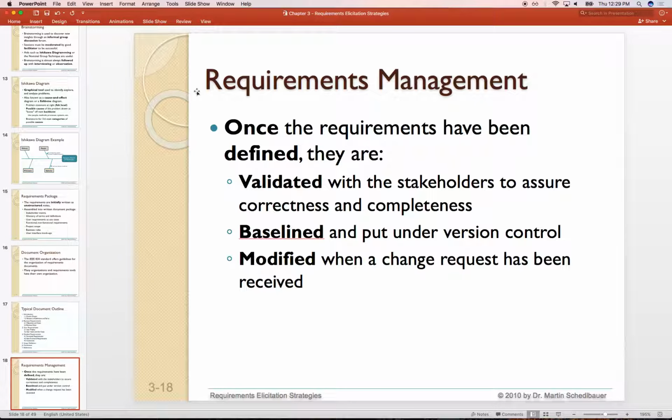And it will be baselined again, and we decide that the delivery phase has either pushed ahead, or we might have come to the conclusion that we can negotiate and take out some other requirement and put this new requirement in place. After some negotiation, the committee comes to that conclusion, and again, everybody is kept informed of the change.